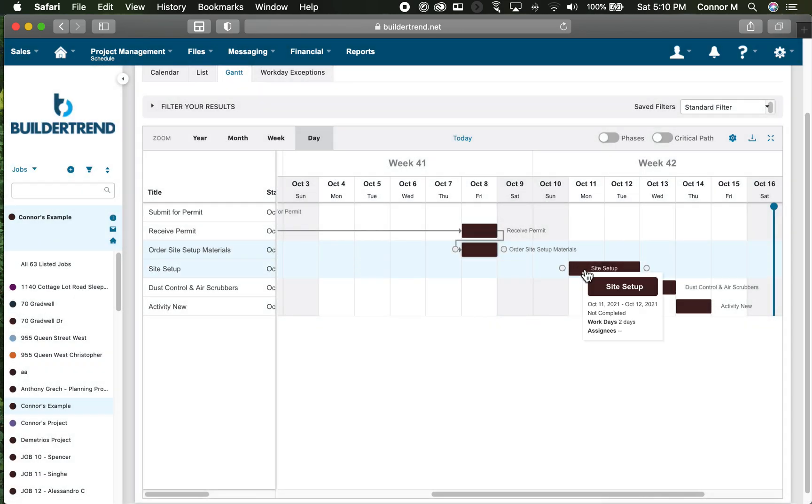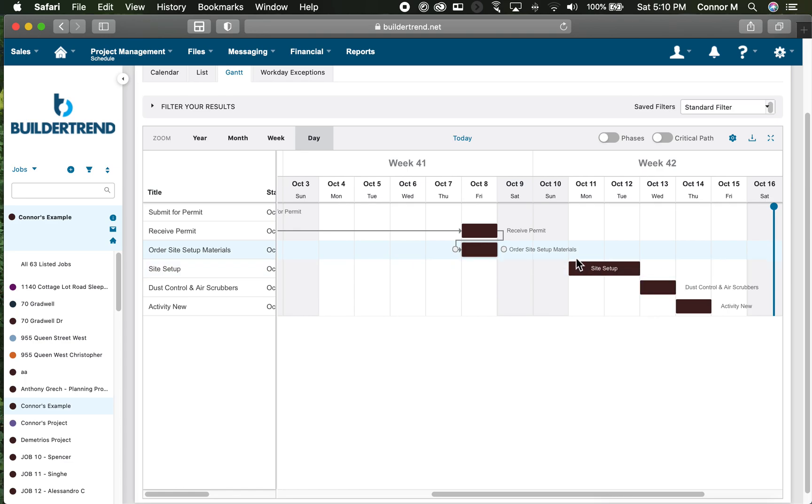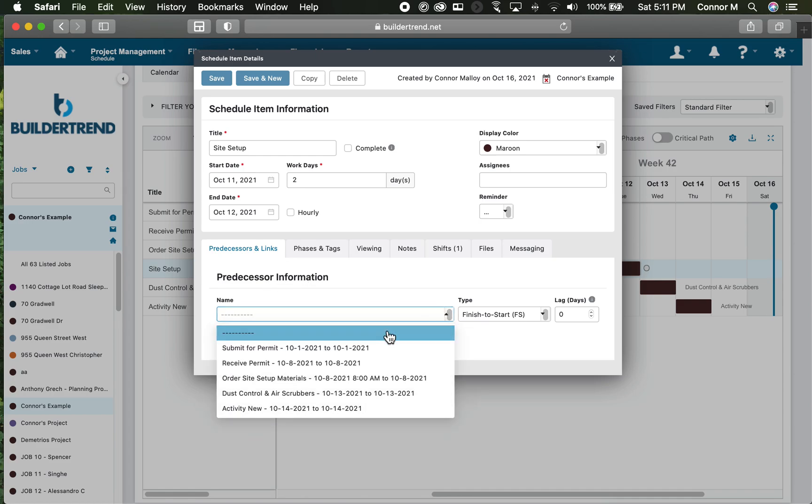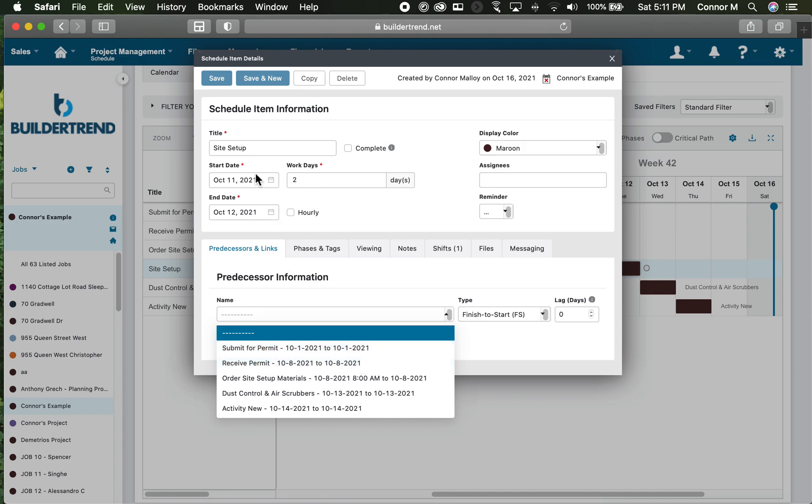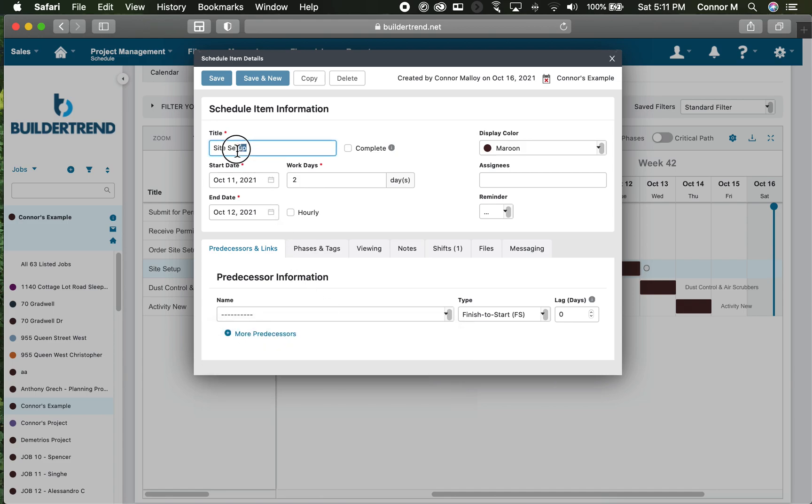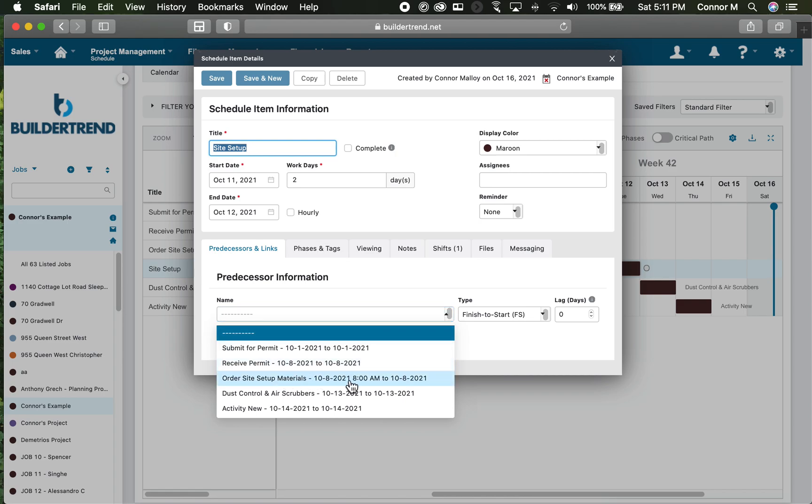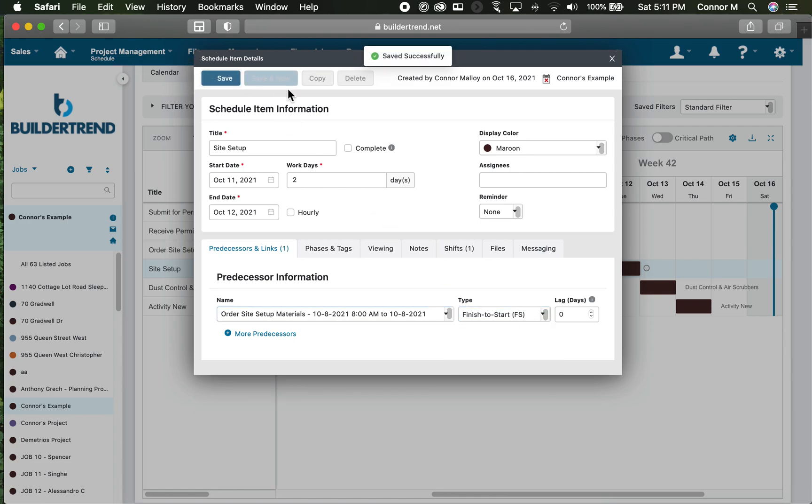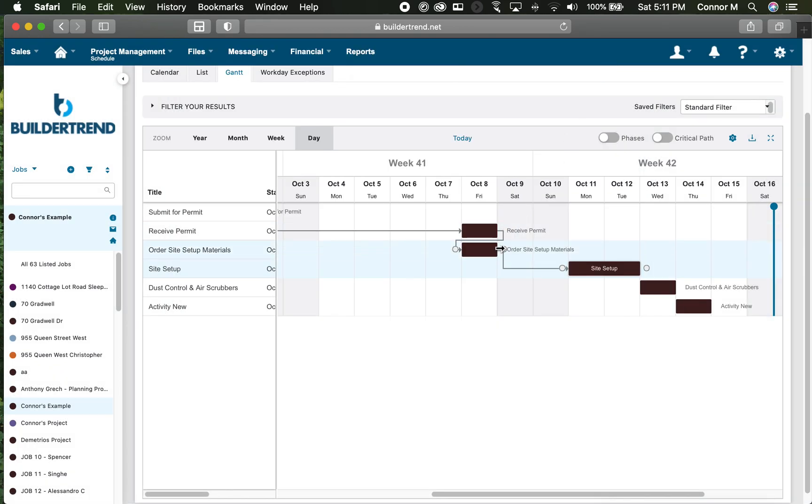The other way I can add relationships is manually through the activity through predecessors. I need to order site setup materials before I do my site setup, so I can click on site setup, go down to predecessor information. This is a list of all the activities you've added to date. The previous activity for site setup is going to be order site setup materials. I simply click that, tell it it's finish-to-start, and click save and close. It's going to display that arrow.